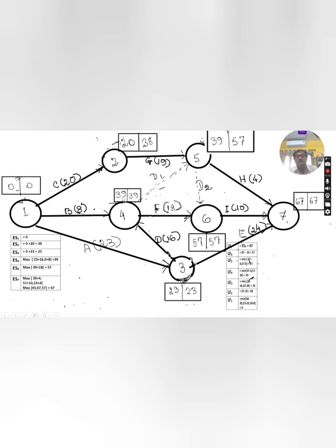Sir, why are you taking the maximum? Again I am repeating, because you have to complete all the preceding tasks. If you take less than 39 as the earliest start time for this node, then what will happen? You have to leave some task. Suppose you are taking 30, then what will happen? This can be completed by 8 days, but 30 days, with 23 plus 7 days, is not sufficient to complete this task.